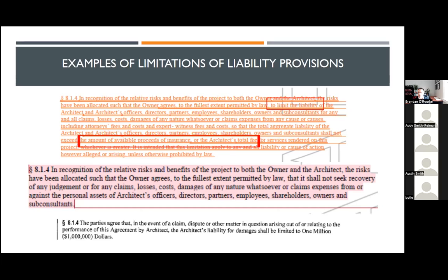As soon as an attorney, including myself, gets involved and we start working up the file or hiring experts to defend the claim, all those defense costs and expert costs are coming out of that $1 million. So if you go to trial and you've spent quite a bit on defense costs, and the claim comes in more than what's left on the policy, there might be a gap in coverage there.